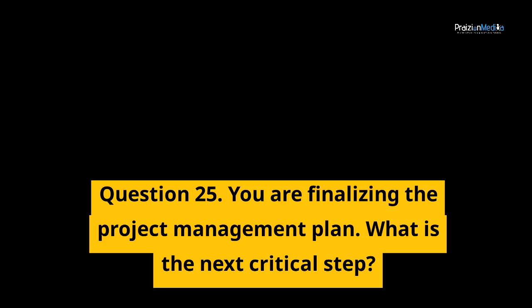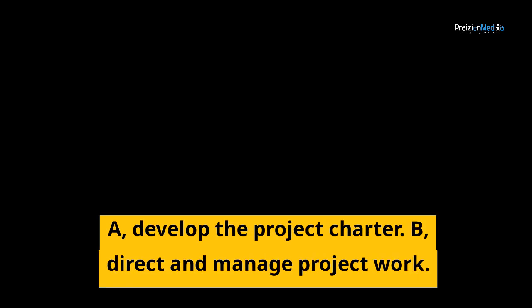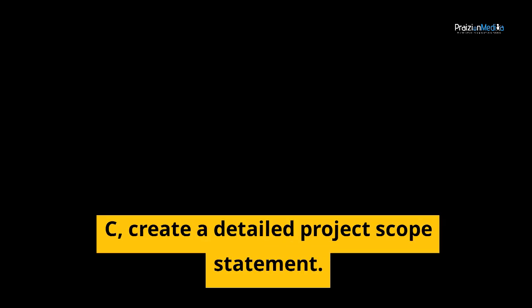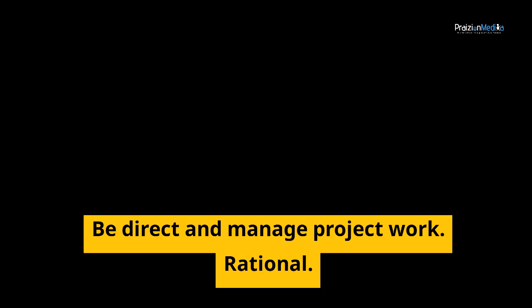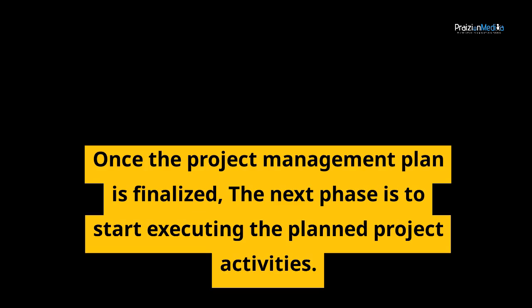Question 25. You are finalizing the project management plan. What is the next critical step? A. Develop the project charter. B. Direct and manage project work. C. Create a detailed project scope statement. Correct answer, B. Direct and manage project work. Rationale. Once the project management plan is finalized, the next phase is to start executing the planned project activities.